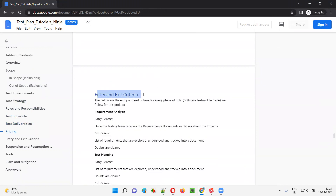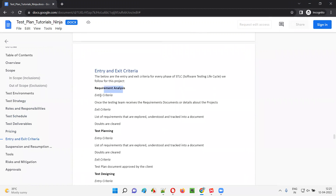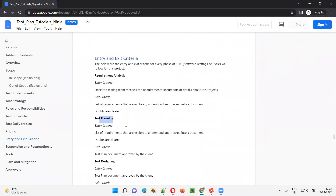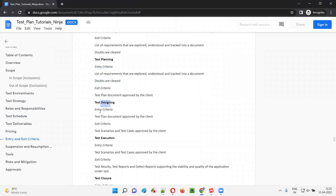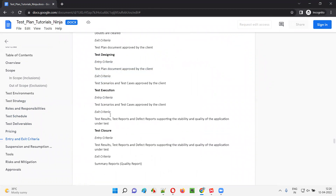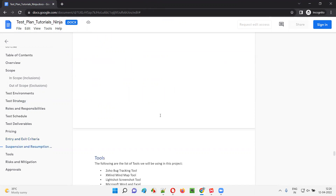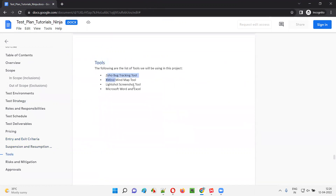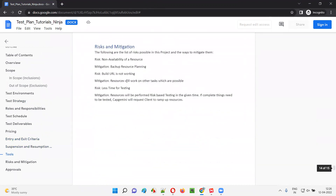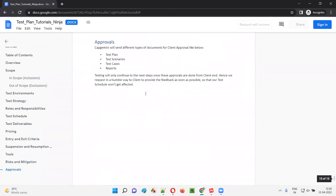Then we have entry and exit criteria for each and every phase of STLC — that is requirement analysis entry and exit criteria, test planning phase entry and exit criteria, test designing phase entry and exit criteria, test execution entry and exit criteria, and test closure entry and exit criteria. Then we have suspension and resumption criteria — based on the client decision, we will do the suspension and resumption. Then the next one is tools — list of tools that we are going to use as part of this project. Then we have risk and mitigations — what are the probable risks and what are the mitigation plans that we are going to implement when this kind of risk really occurs. Then approvals.